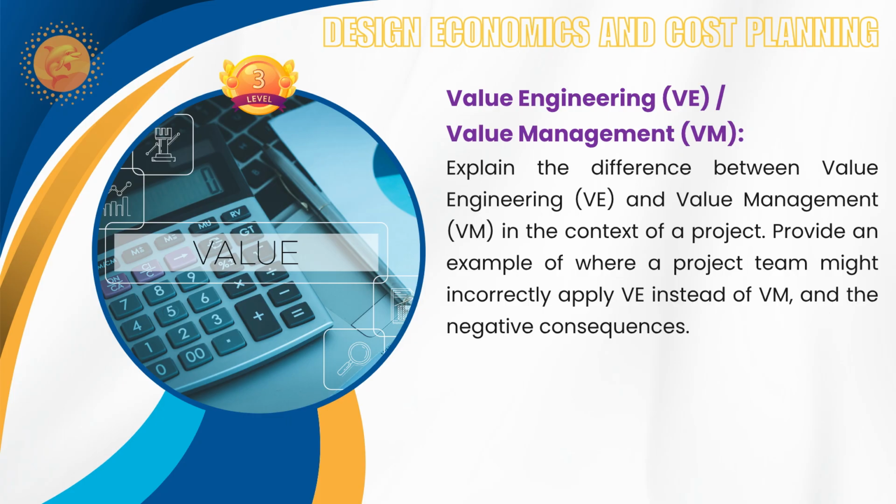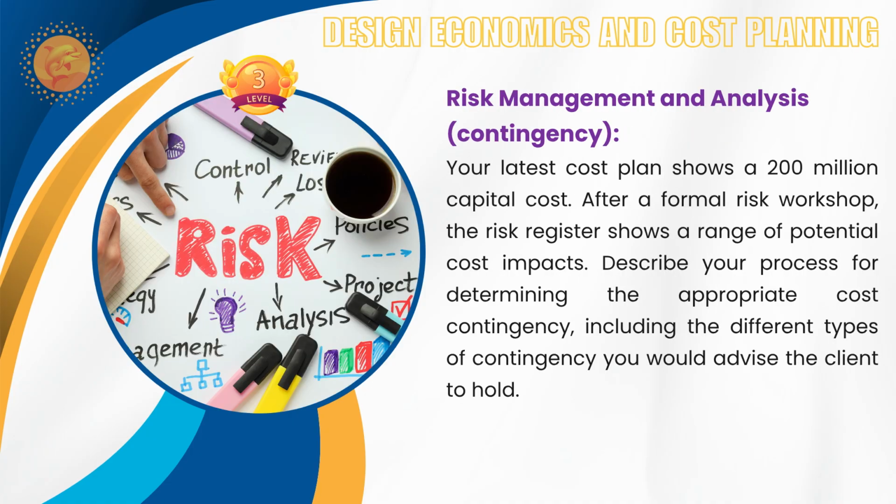Otherwise, if you are doing it for the client, then this value engineering benefit, as per the FIDIC standard, has to be shared, either through proportional arrangements within the standard contract or anything specific for the employer. So that is another constraint. These things you have to consider and advise about what is value engineering and what is value management. Okay, so next one is risk management and analysis, particularly for contingency allowances.